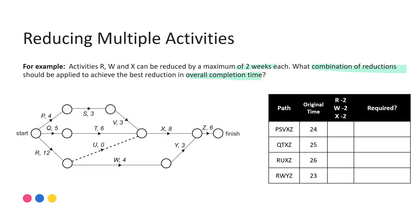When I'm using the table method rather than a forward and backward scan I can identify my critical path. So initially the critical path for this project network is R, U, X, Z with a duration of 26.